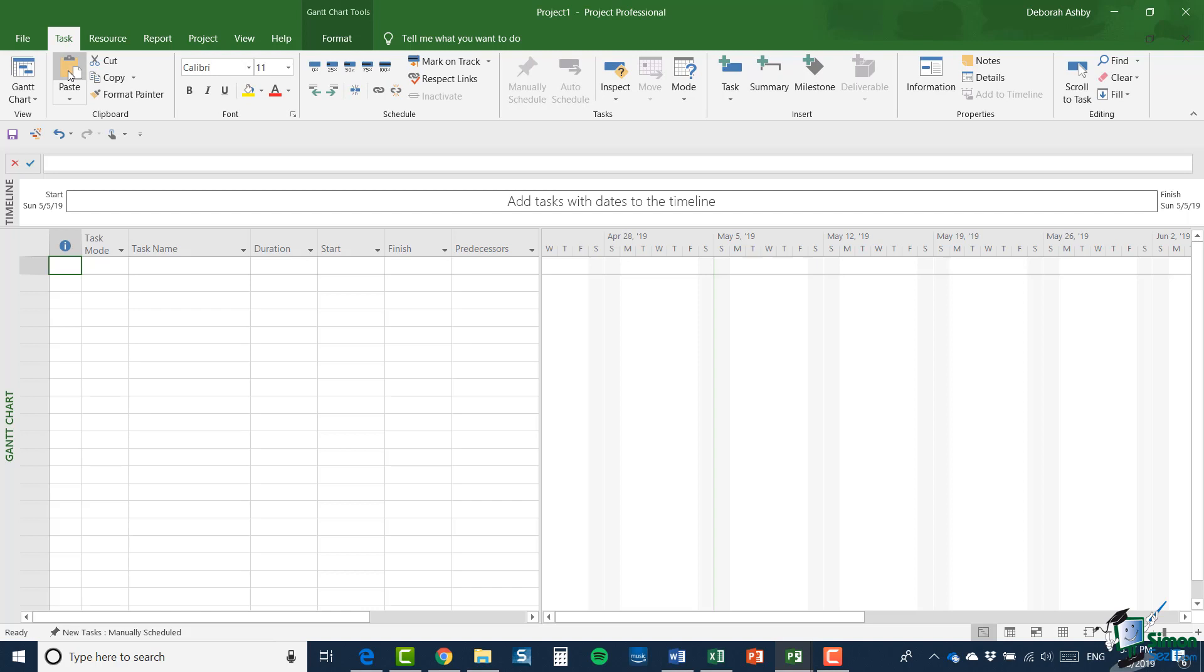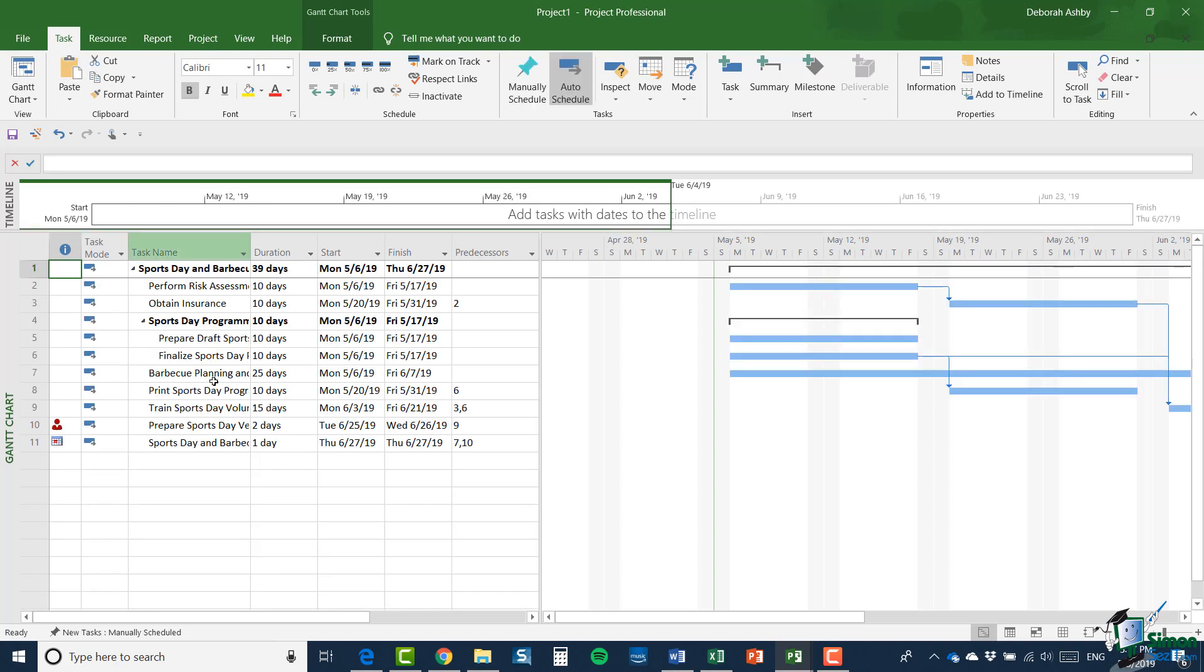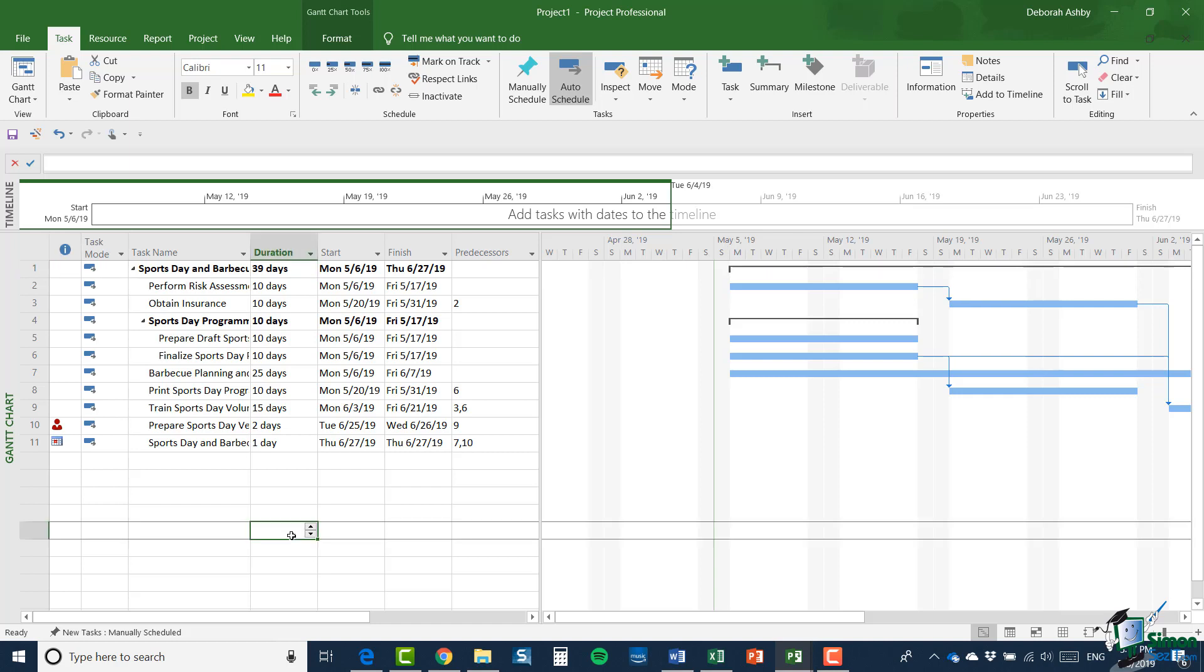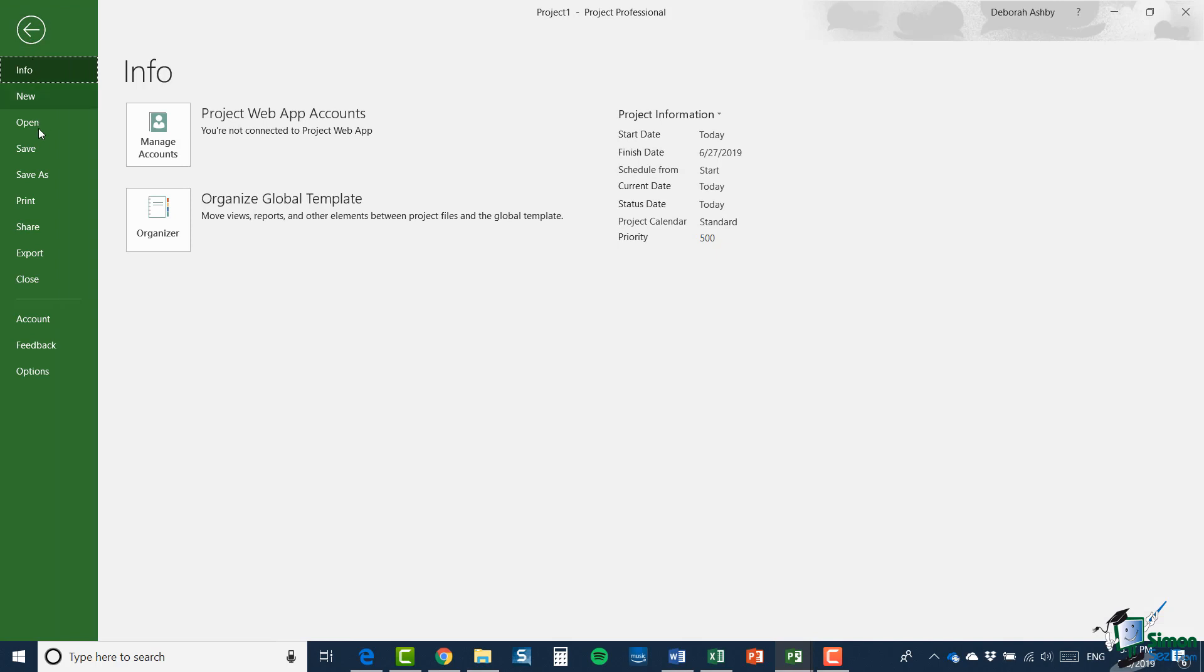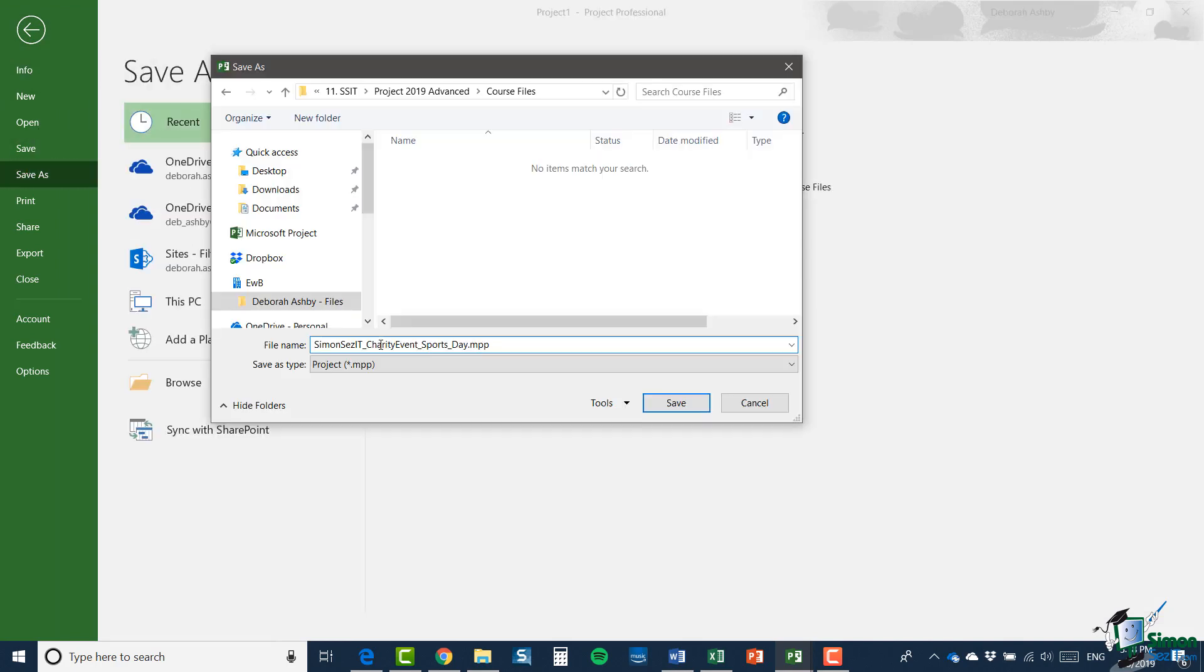I'm going to copy them to the clipboard. And then I'm going to switch back to my empty project. And I'm going to paste those tasks into that project. Now having pasted those in, note that within what was a summary task in the original project, the dependencies still exist.